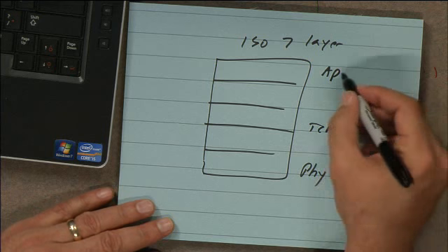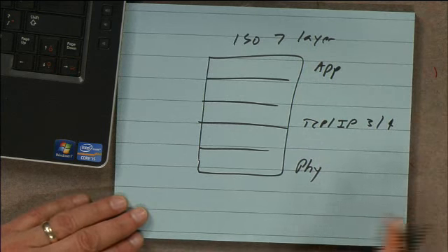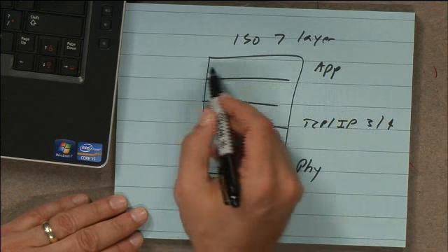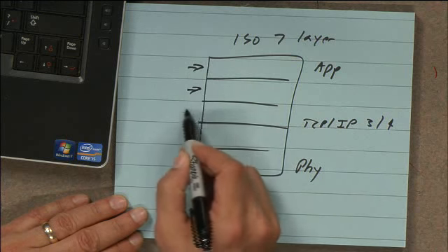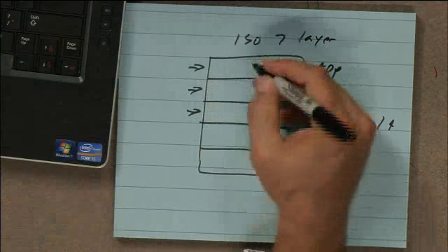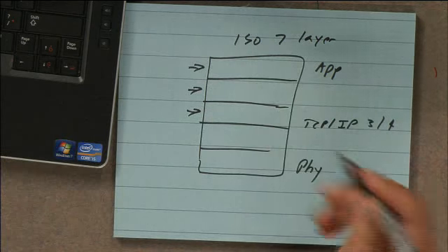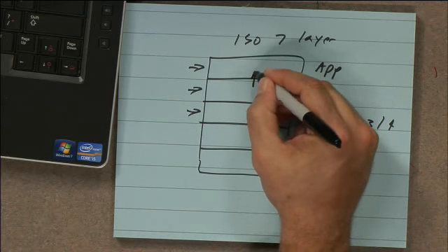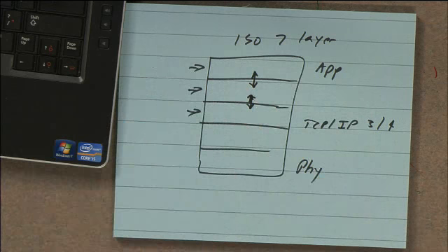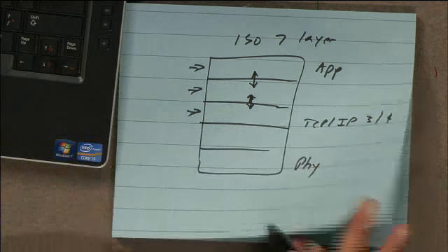So you can actually have, in parallel, people working on different layers of the stack, okay? And that's possible because if you design this stack right, or any stack right, the only real thing you have to worry about is whether you've got the API design right. And if that's the case, then you can go through some parallel development activities.